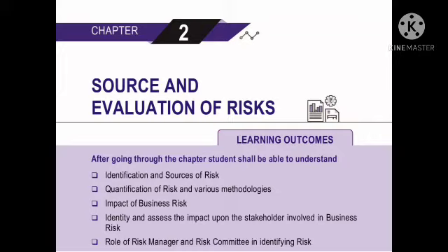2.2 Quantitative risk assessment. Quantitative risk management is the process of converting the impact of risk on the business/project into numerical terms. This numerical information is frequently used to determine the cost and time contingencies of the project. Several methods of contingency determination, which are based on the results of a quantitative risk assessment, are explored. The objective of quantification is to establish a way of arranging the risks in the order of importance.